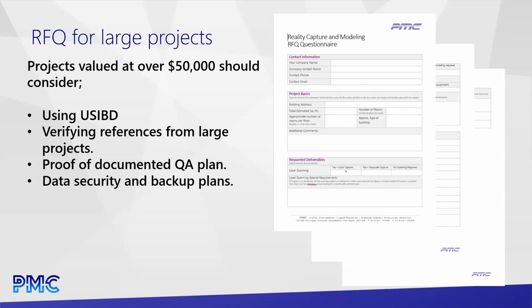Definitely, if you're spending $50,000, demand references and call the references, right? And check them. Like I said, when you start talking these really, really large projects, if there's, in the US, maybe 2,000 scanning providers out there, of that group, I would only trust a few dozen tops with doing million square foot plus jobs correctly.